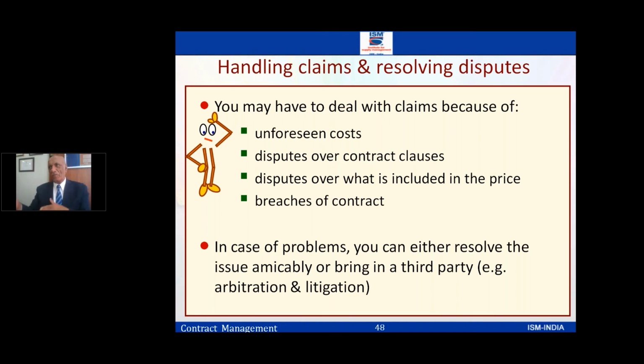One path is going for litigation, which may be economical per se, but it's a long cycle. It can be delayed for years and years. Arbitration could be faster, it could be costlier, but the results are there. So most of the MNCs go for arbitration. Whenever I work with MNCs, I ask them, what is your applicable law? They have to put down some applicable law, but for arbitration they go with a different approach.